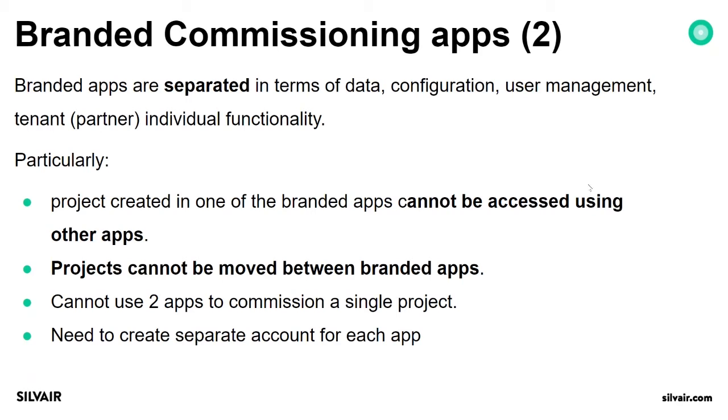Projects cannot be moved between branded apps. This is very important to understand. If you create a project in our Silvair application, but you want to move this project to, let's say, a Macmon TrueBlue application, it won't be possible.